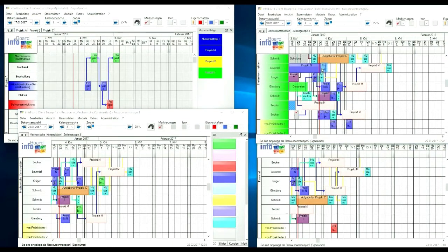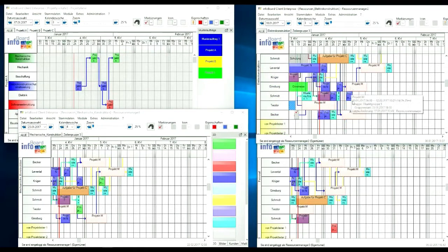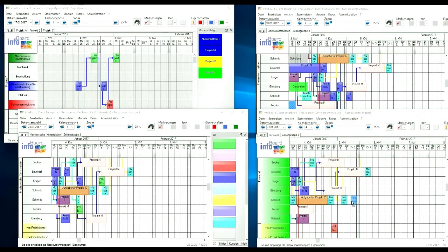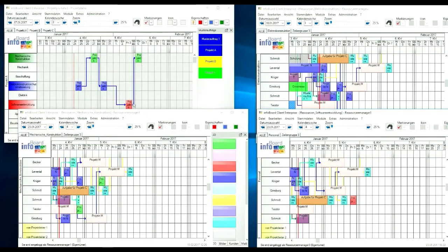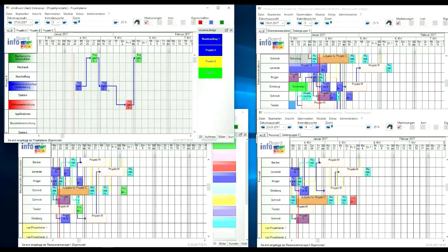If the period of the individual object is changed in the resource planning board, the project schedule synchronizes automatically. After the synchronization of the resources, the objects of the first section change similarly. The department manager obtains the correlated information and has to find a free resource for this change. The project was synchronized under consideration of the resource planning board.